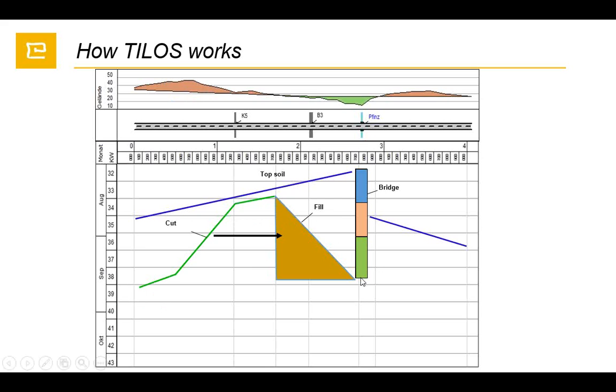All the lines and shapes have a meaning. Here the filling activity has a triangular shape, which means that when you start to work at this point and progress, the area is getting closed until you complete all works for the filling activity. It represents this green area for filling, and the activity closes the area. So if we have any clashing activities, we can see them directly here.